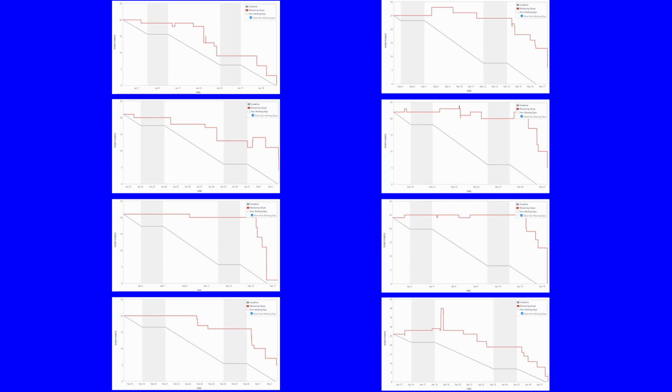So what do I look for at this point? Well, I'm looking to see if, on average, there are a lot of sprints where we continuously don't finish work. Are there a lot of sprints where we continuously pull in a lot of work and yet don't complete, for example? Or do we have a lot of work that doesn't get completed in the first half of the sprint, and always at the end of the sprint? There you go. That is the burndown chart, what it is, how to read it, and what I use it for. That's it.